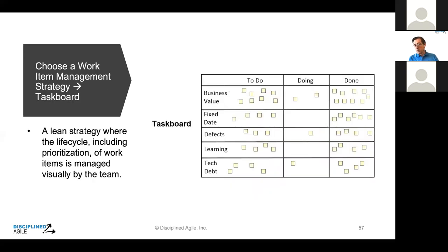And it's complementary to our second technique, which is a task board. And you see here, this task board is basically a lean task board with swim lanes where we pull stuff across the board as our capacity is to deliver it. Now, I'm not going to go into all the nuances of how to create these boards and talk about minimizing work in progress, WIP, and using constraints, and what columns do you want to use. But you can do the homework and how to create a good task board. Context counts, but definitely it's a recommended technique.